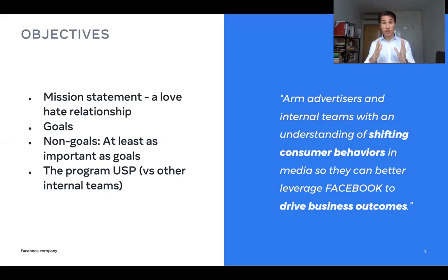Importantly, what are our non-goals? I see too often, over the course of my career, that non-goals don't make it to the list, but I think non-goals are quite important because they enable us to be very clear: this is what we're working on, this is not what we're working on. For example, for us, deep dives are something that we'll focus on in 2021. In 2020, we're focusing just on these things. If you come with a request that's outside that, that's over here, and we can look at it in the future.